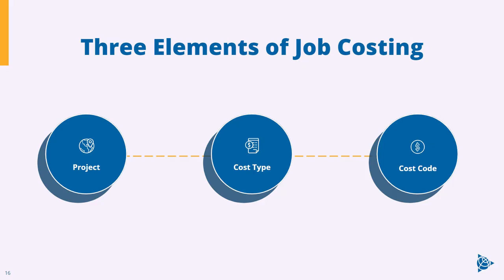Now that you know some accounting and job cost basics, let's take a closer look at the three basic elements of job costing. When a construction accounting team posts an accounting transaction, their system will ask for three pieces of information: What project did we spend this money on? What type of cost is it — for example, is it labor, equipment, or materials? And third, how was the money spent — was it on a CSI division, a specific kind of activity, or a phase of the project?